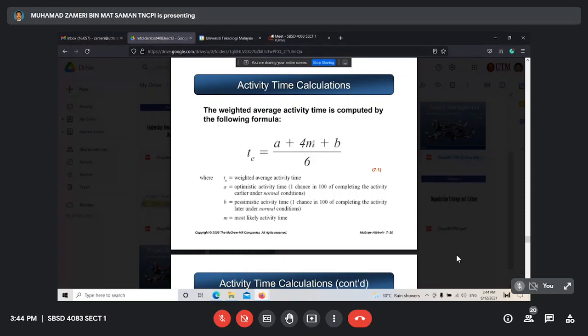But if we have a range between 8 and 12, we can reduce our risk. If we can work faster, we can finish on 8, on 9, or on our target of 10. If something happens, we can finish on 11 and at most on 12. So we have a range between 8 and 12, but our target M is 10.